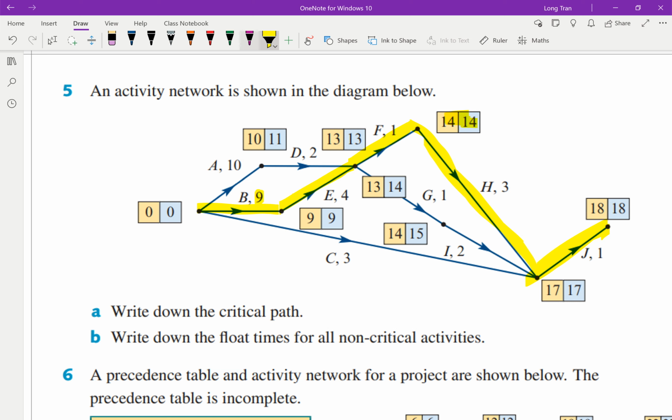So if I were to answer this question, write down the critical path. It is B to E, activity F, and activity H, and then activity J. Those are the activities with a critical pathway. None of those people, when they start these activities, it has to be on point. They have to start exactly at 0, and it takes exactly the duration they predicted in order for them to finish the entire activity in 18, say, minutes or days, whatever the unit duration is.